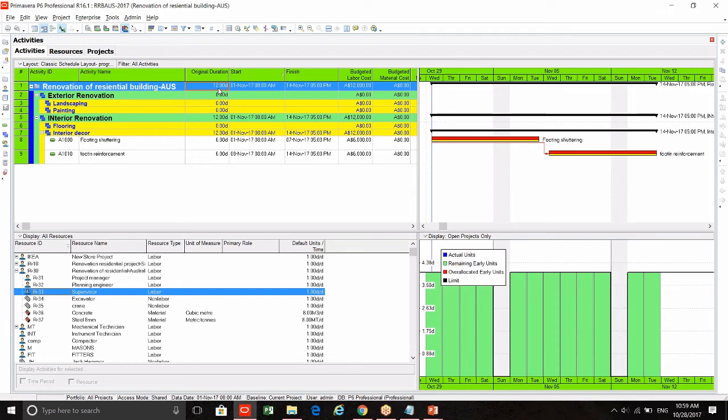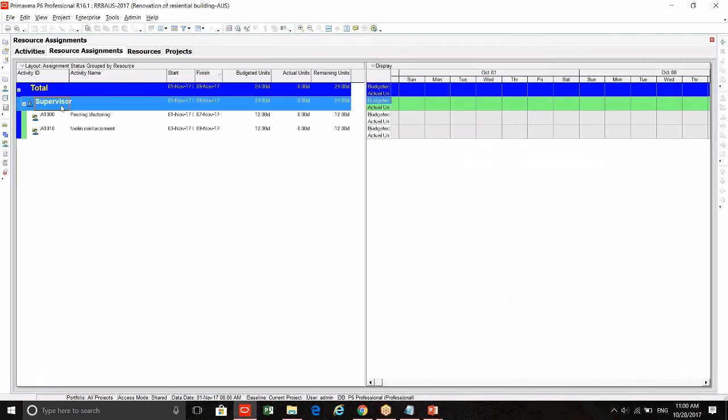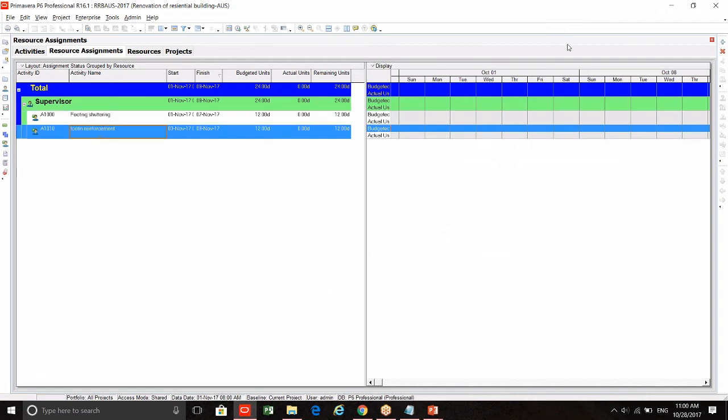Instead of using this option, let's go back to the original position, click on schedule and come back. Now you see it's only 8 days. You can do manual leveling techniques by yourself. Say you are telling, right, one resource working in one place, so you can go to resource assignment, and here the program will display resources and the activities which it works.